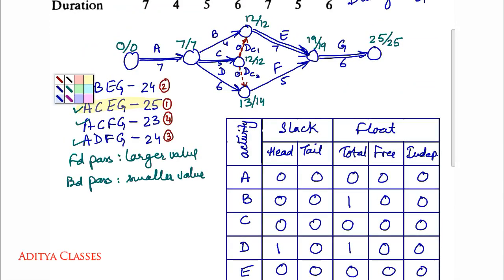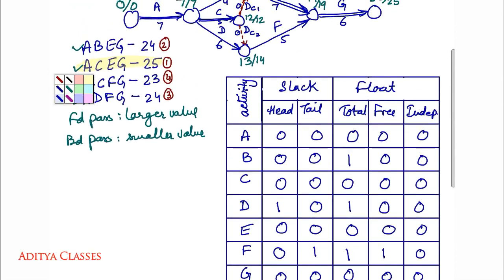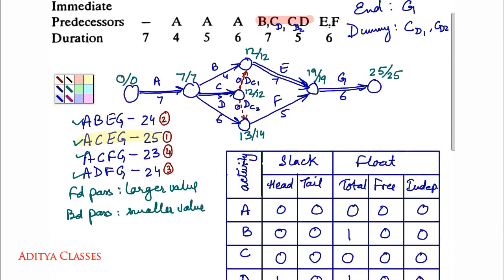For activity G: head slack is 25 minus 25 equals 0; tail is also 0. Total float: 25 minus 19 minus 6 equals 0. Everything for G turns out to be 0. Here are all the slacks and floats for the given network.